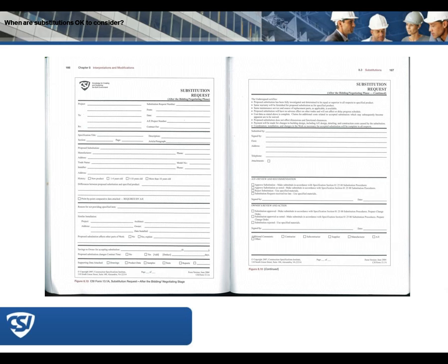That next, that it does not affect dimensions or functional clearances. It's all still accessible if that's what is in the contract documents. That if costs are applicable, that payment will be made for the changes to the building. If this affects some change in the building that isn't a part of the substitution, that the architectural engineering firm will be made whole.